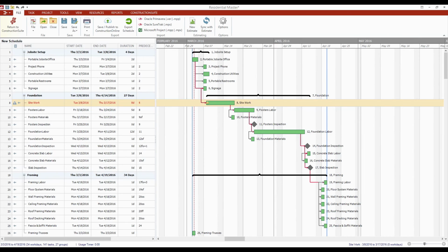All the groups and tasks, at least, would match up to your categories and subcategories from the estimate. And from there, you'll just need to go in and put in the durations and the predecessors for all your tasks and build that out. Sometimes you might have an easier time doing that because you might have smaller estimates or smaller schedules. You don't want to put together this massive template that needs to be trimmed down to make it work. So sometimes it might be easier to build your schedules from your estimates. Other times it might be easier to just use your templates.